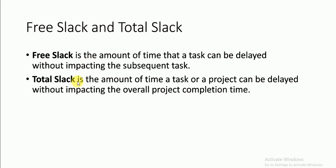And what is the Total Slack? Total Slack means the amount of time a task can be delayed so that our project finish date should not be delayed.